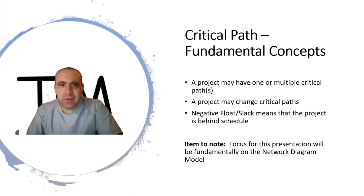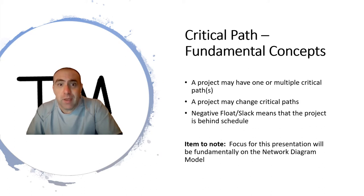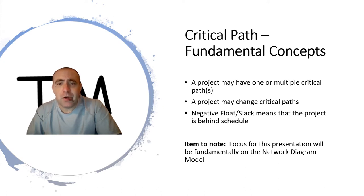Here are some fundamental concepts. A project may have one or multiple critical paths. Projects with more than one critical path are often some of the most challenging projects to manage. There are instances in which there may be a change within critical paths. Instances where this occurs most often indicates an issue has emerged. For better understanding of mitigation strategies, I urge you to review this channel's presentation regarding risk management. In addition, part three of this critical path series will involve schedule compression techniques.